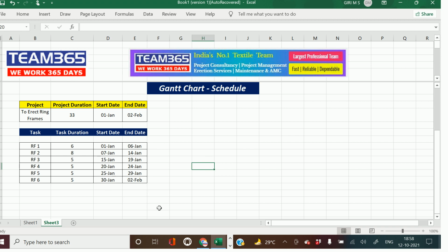So this way you can change the task duration, or for monitoring you can put it in. This Gantt chart schedule is made, then monitoring chart similarly you can make and put the actual data so that you will know the deviations. Say your machines were supposed to arrive on 1st Jan and you were supposed to start the erection, but due to some reason it has been delayed by 15 days. So then the date becomes 15 Jan. So automatically all the dates have changed, right? So this way the table is functional.